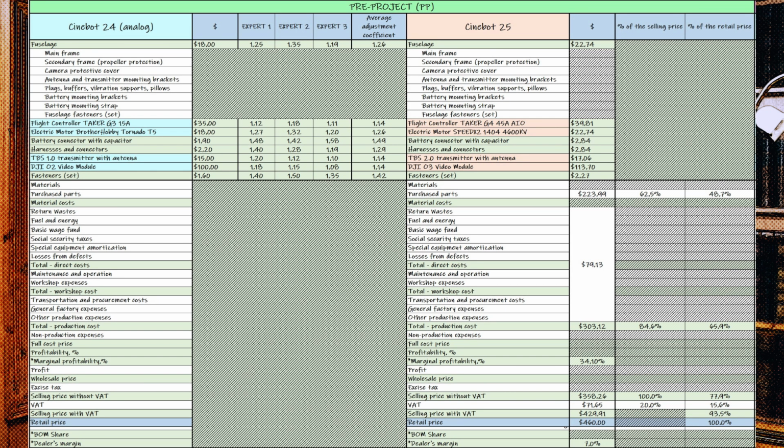1.6.1, general description of the methods. The essence of the method is to adjust individual calculation items according to the coefficient assigned by a specialist of the expert group, which usually includes either specialists from the project's working group or third-party involved experts. To begin with, it should be noted that the condition for applying the coefficient methods is the presence of a basic analog of the previous generation.